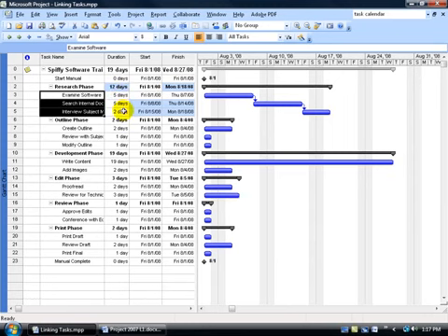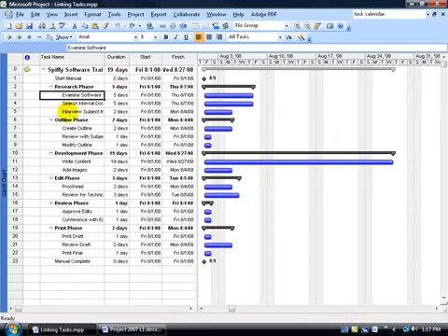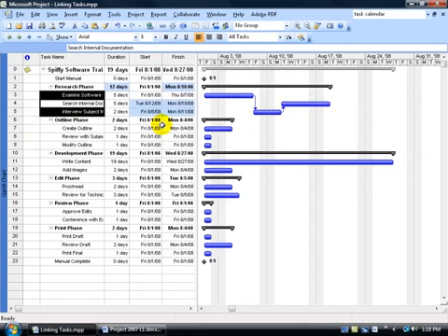Now whatever you do, be sure that you absolutely link these in order. And what I mean by that is when I hit the undo button and I go, okay, let's see, I want to link this task to the next one, and oops, I missed. I clicked that one down there, and let me go ahead and back up and hold down the control key and select that one. The order that I selected them in is how they're going to be linked. So when I click on the link button, look how it works. I selected this one first, this task down below second, then it has to go back up to the middle task here.